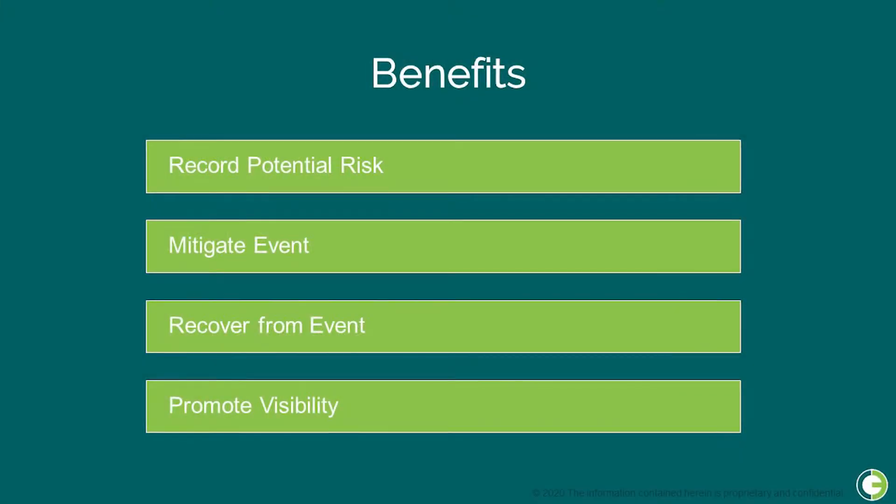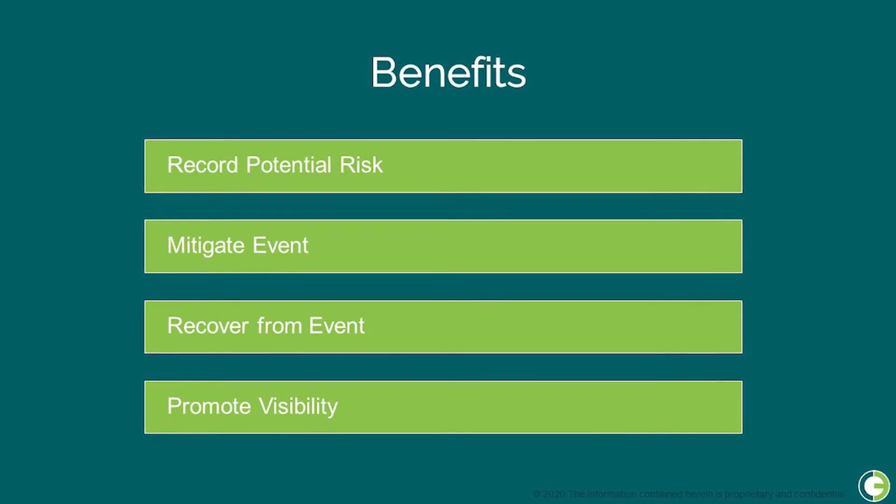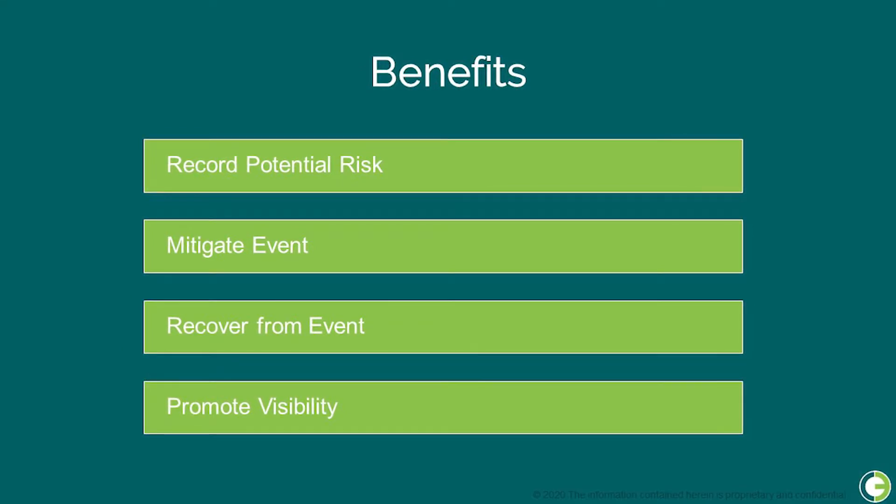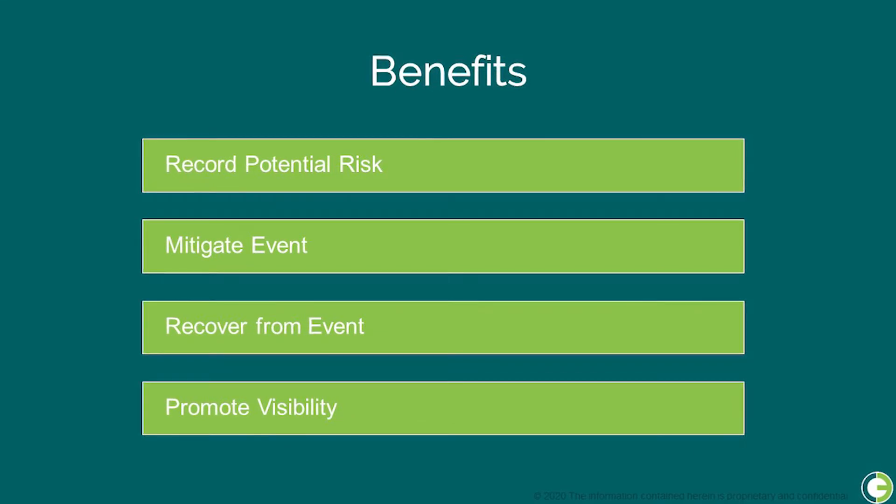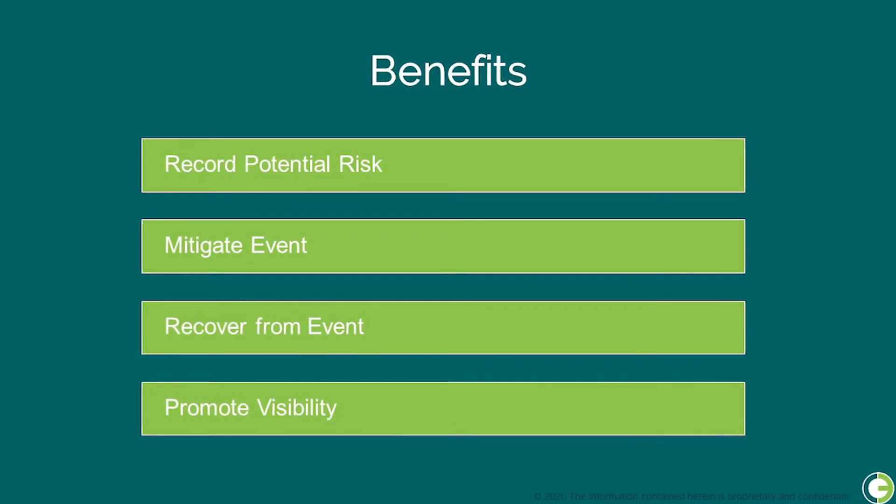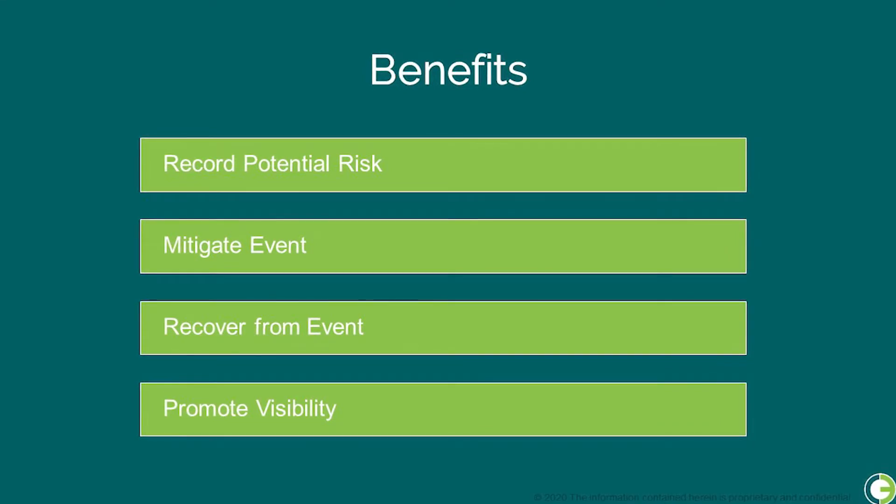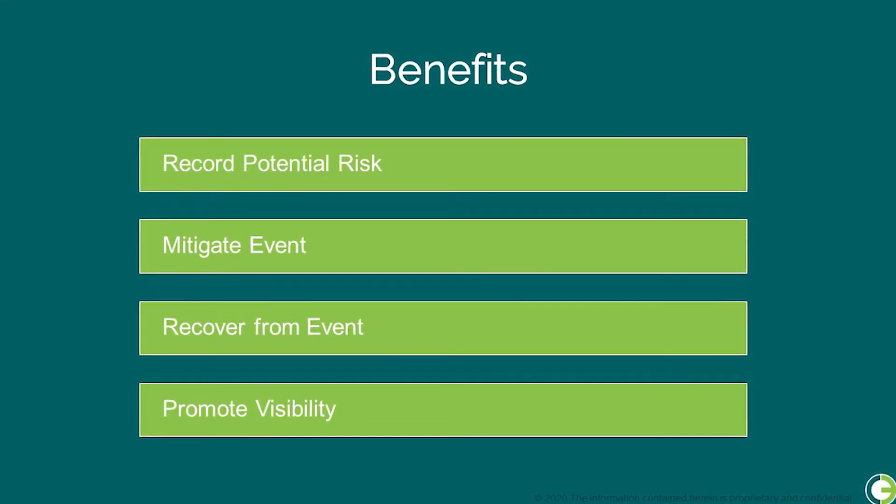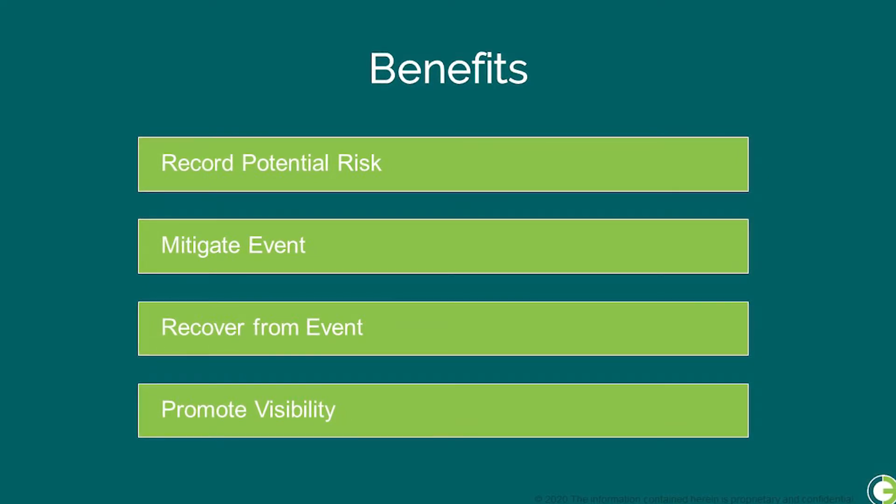Events come up all the time that can affect a project's scope, schedule, and budget. By having a place to record and track any foreseeable risks, you can make plans to prevent the event from happening in the first place, and a plan for getting back on track if the event occurs. You can also assign these tasks to individuals or teams so everyone has visibility into the current state and action plans.